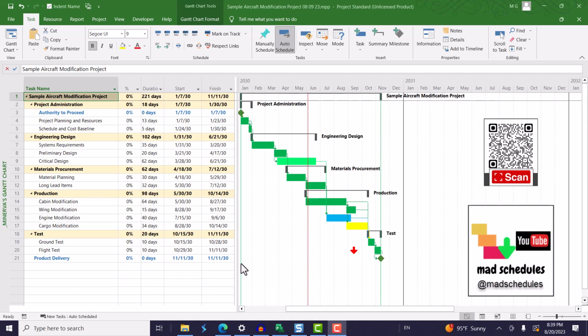But this is a high level schedule, and sometimes when you're before a pre-contract, you may have phases that are very long, but you will tell the customer that once a contract is signed, you will detail out the schedule, and it will have less duration than the 44 working days. If you have high duration in your schedule, it should be less than 5% of your scheduled tasks, not to include summary tasks.